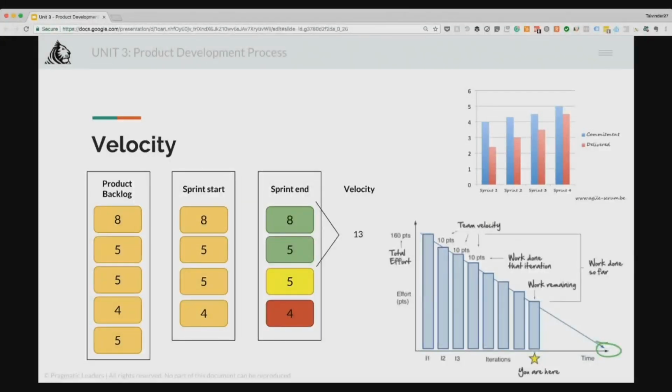At the same time, you can imagine if the team is not gelling well, if they're not tuning well, then it's better to break apart the team and set up a different team, because then the productivity will obviously decrease. So existing teams can track their velocity to ensure consistent performance over time, and can confirm that a particular process change made improvements or not. A decrease in average velocity is usually a sign that some part of the team's development process has become inefficient and should be brought up at the next retrospective.